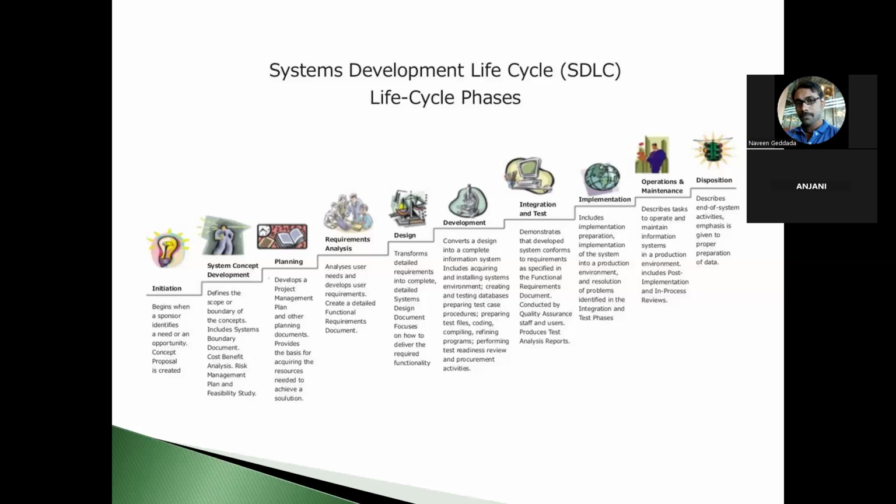Okay, here, in the R6 requirement, you are adding a few steps to implement, or to give some detailed information about the calculation part. Now, by adding these two steps into requirement R6, do you have any impact on the already defined requirements, that is, requirements R1 to R5, and our requirements R7, R8, R9, and R10? You need to check, by adding these two steps, whether we have any impact on the requirements before R6. We have R1 to R5, a set of requirements. So with these two steps added, do we have any impact?